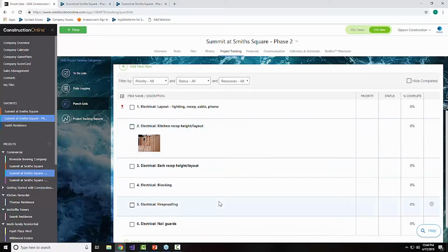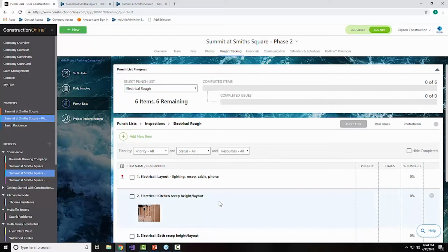Things that keep getting added to the punch list over and over again, you can add those to the template. Or things that get checked off, but we always have to go back and revisit because whoever's checking them off isn't doing a good enough job inspecting. Maybe that's an opportunity for us to have some continuing education to provide a little bit better insight on where the pitfalls might crop up 6 months down the road for this particular section.